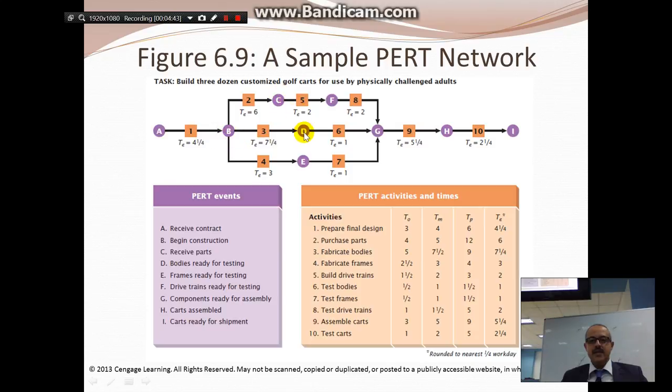So these are events A, B, C, D, E, F, G, H, I. When we reach I, it means carts are ready for shipping. Here in A, we receive the contract. When we reach point G, all the components are ready for assembling - we have received all the parts. In point nine, we actually assemble the carts. Once we reach H, the carts are ready. Did you guys get to understand those steps and activities, events and tasks?